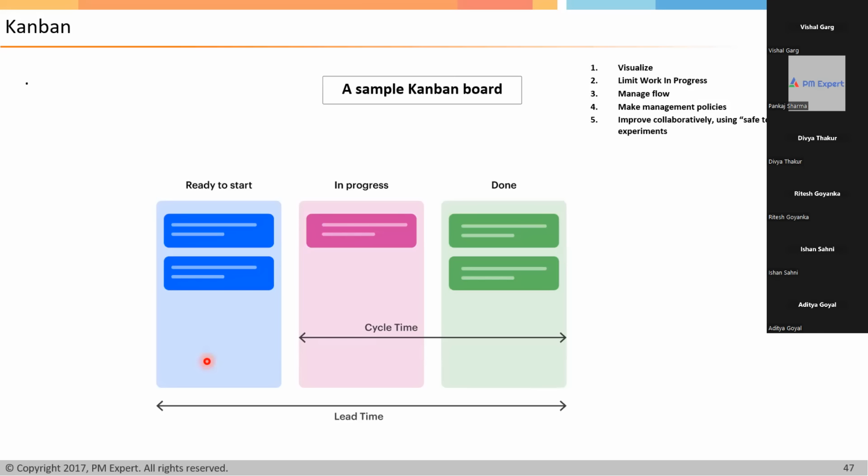Right. Yeah. So I'll tell you, this is a very important concept to be understood. Why? When you talk about software development work, you see a lot of examples on Agile from software development. If you browse the internet, when Kanban is used for software development, people have used cycle time and lead time as the same thing. But when you talk about production systems, the meaning of cycle time and lead time is very different.